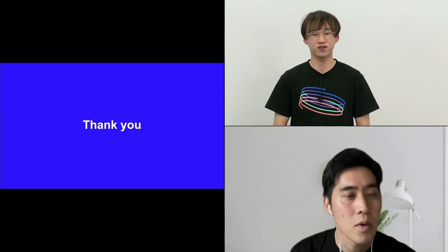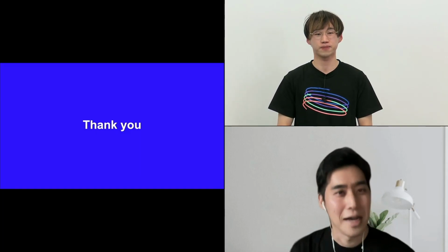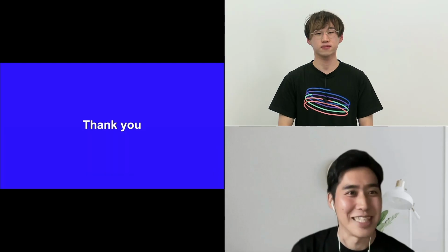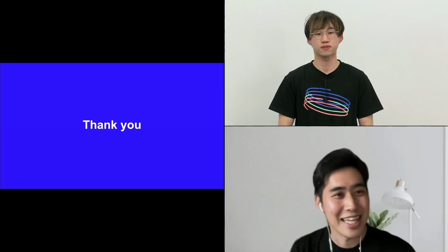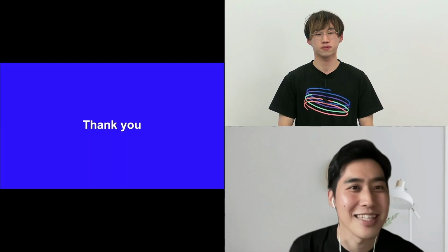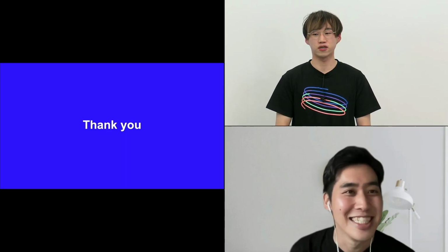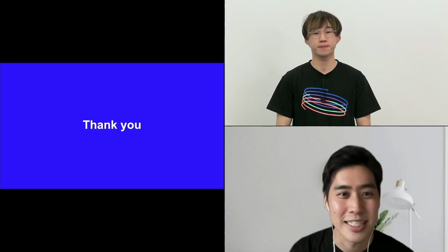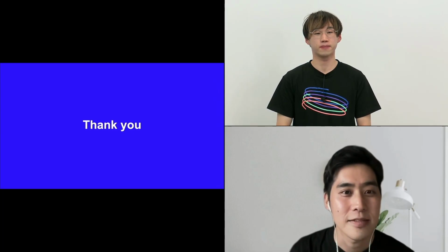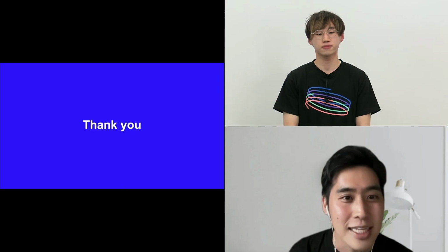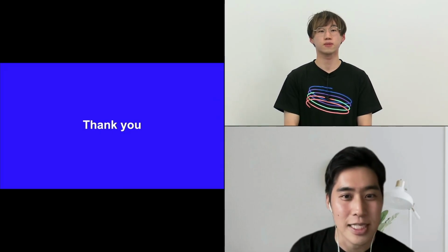So maybe 1.5 to 2 times compared to the initial man-hours that we had projected. Yes, with Jetpack Compose and complicated screens, I think we need to budget those additional man-hours. Okay, since it's time, final question, please.